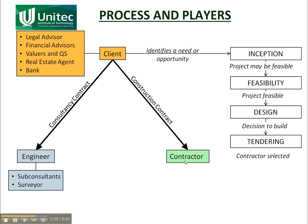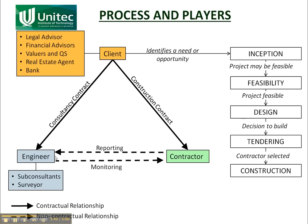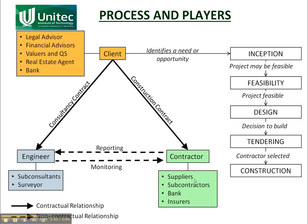The contractor is now legally bound to build what's in the contract, and the client is legally bound to pay him for it. During the construction phase, the engineer is involved in monitoring it, making sure the contractor is doing it properly. The contractor is busy building the project works, and he'll have suppliers supplying the materials. He'll also have subcontractors — it might be that he doesn't have roading expertise and has to hire another contractor for that. They are usually in debt until they get the final payment, so they need to have loans from the bank and they need to insure the works.